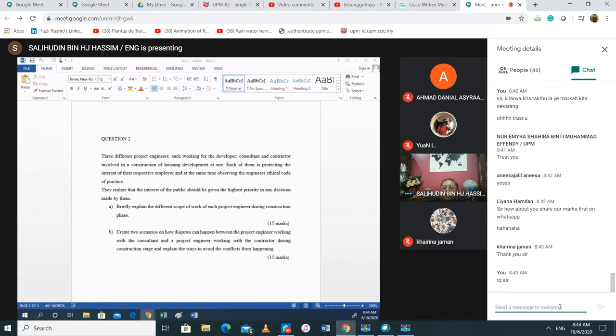Normally they call it superintendent representative. There is only one representative at site, but he reports to the boss. The boss is in charge of 2-3 projects. The question should be how many standing supervision officers. Standing supervision officer is the representative of the SO who is at site all the time. The boss doesn't have to come to site every day because it would be very costly for the projects.